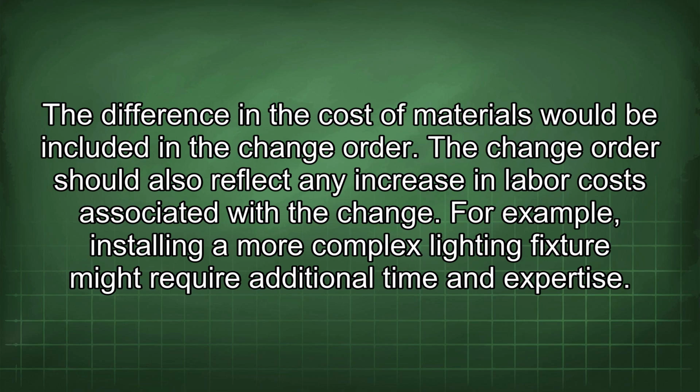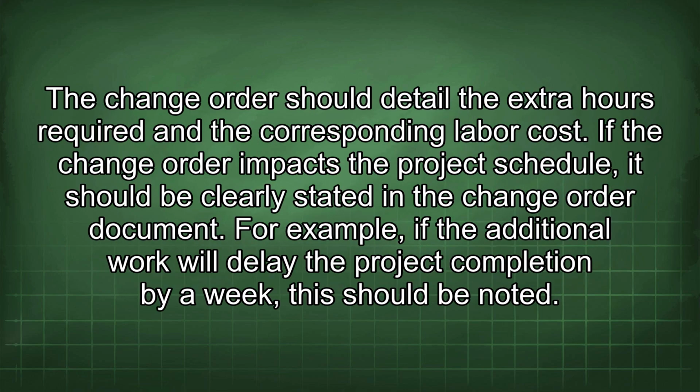The change order should also reflect any increase in labor costs associated with the change. For example, installing a more complex lighting fixture might require additional time and expertise. The change order should detail the extra hours required and the corresponding labor cost. If the change order impacts the project schedule, it should be clearly stated in the change order document. For example, if the additional work will delay the project completion by a week, this should be noted.